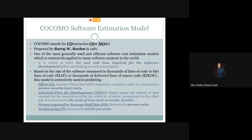The very basic concept behind the COCOMO software estimation model is based on the size of the software, which is measured in thousands of lines of code or kilolines of code, called KLOC, or thousands of delivered lines of source code, called KDLOC.